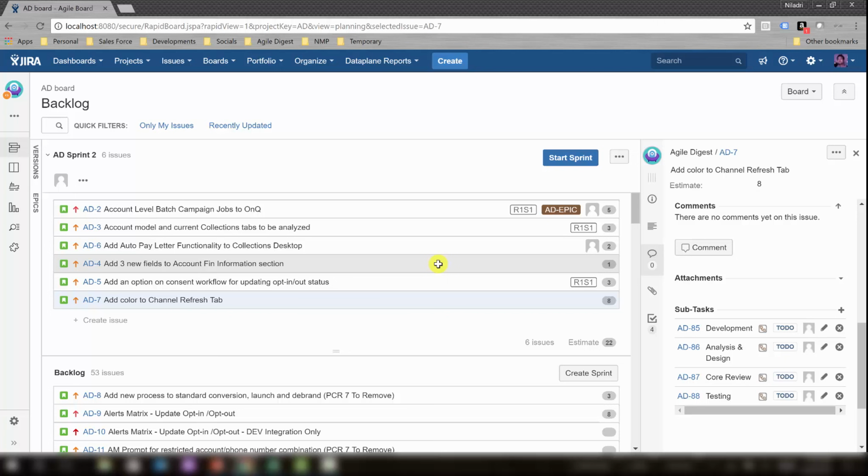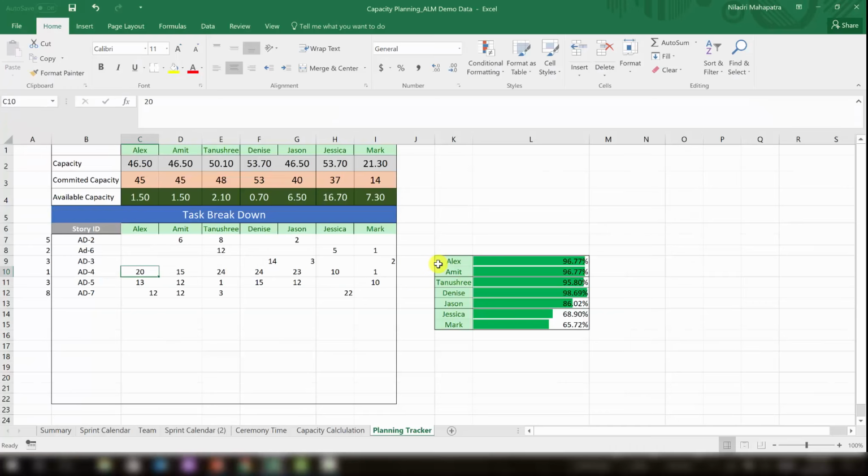If it is taking time for a scrum master to create the tasks one by one by himself, that will be too time consuming. So it's always advisable to just mark it somewhere and update from their desktop when they get back to sit, and have this ready. You can still track how much capacity you had and how much you are filling up, and stop the sprint planning when you see that you will not be able to make any new stories complete.